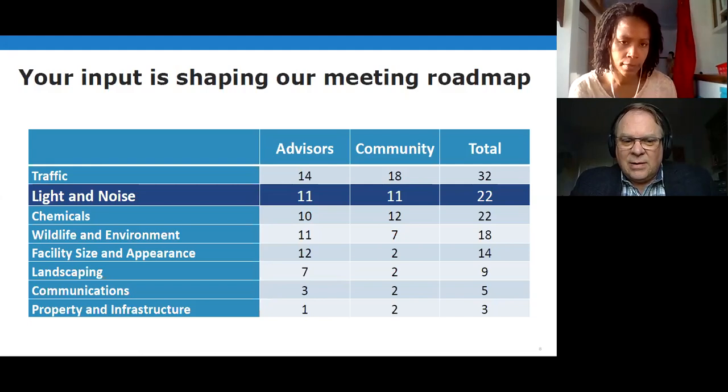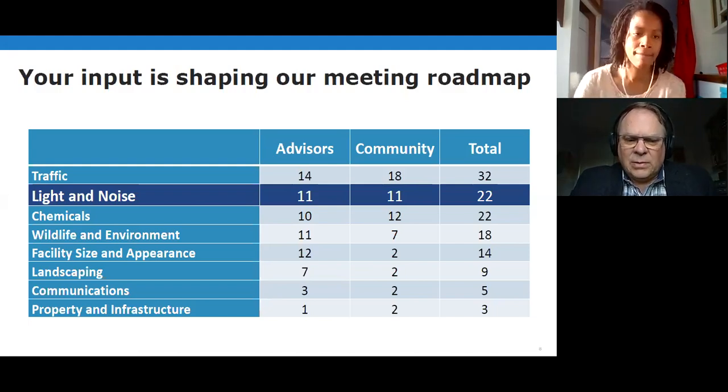I know Lusted Road is not in the exact spot that the county records say it is, so they've been trying to reconcile all of that information, which is why they've had to extend the surveys a bit beyond just the existing properties we own, to make sure that we are on the properties that we do have access rights to. So I hope that helps.